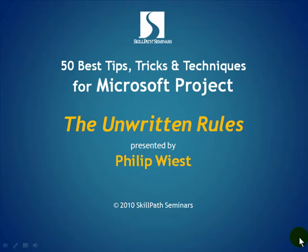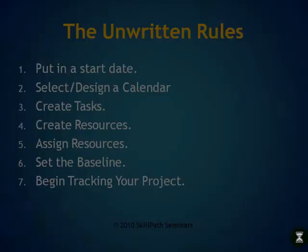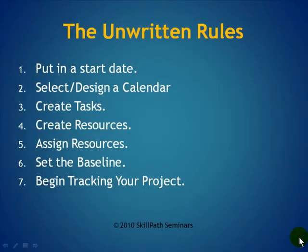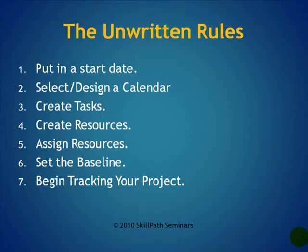But until it does, here are the steps for working with Microsoft Project I wanted you to know. Step one, put in a project start date.